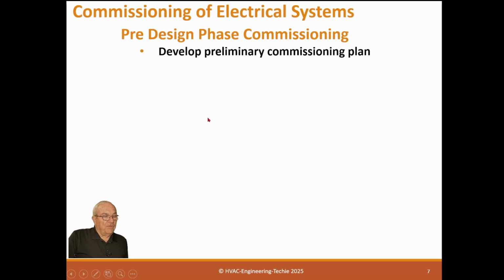So now, the first thing the commissioner has to do is develop a commissioning plan. It's required in every job, but it's basically going to tell everybody else what you're planning on doing under the job. Because even though commissioning is fairly common nowadays, every commissioner does things slightly different, so you need to explain how you're going to do yours.